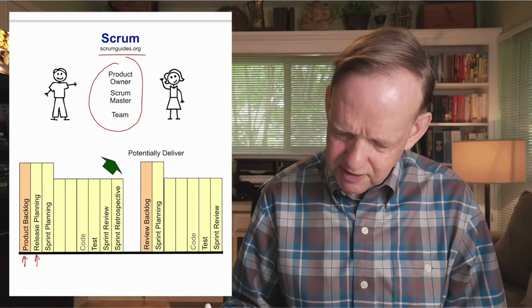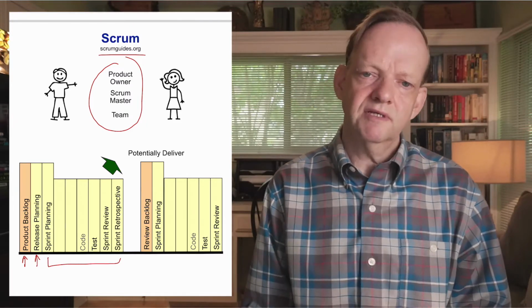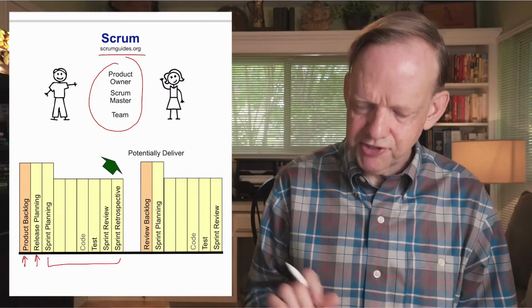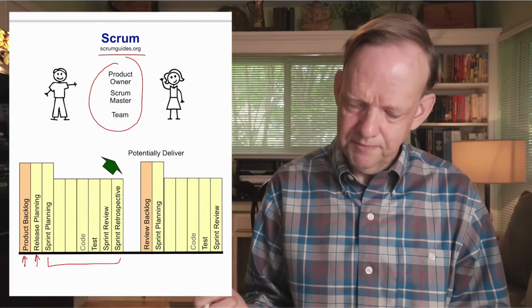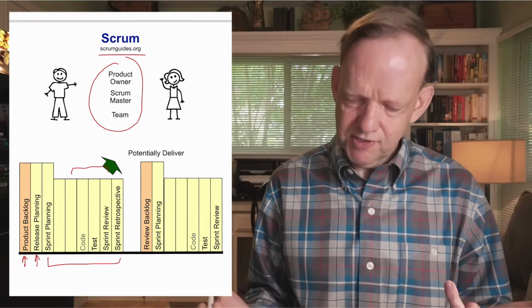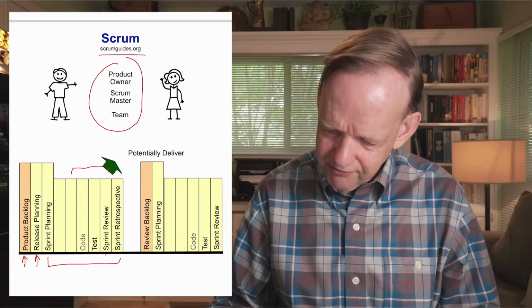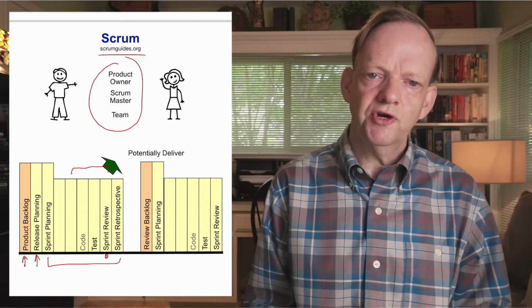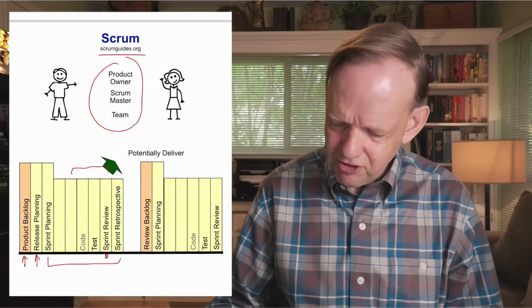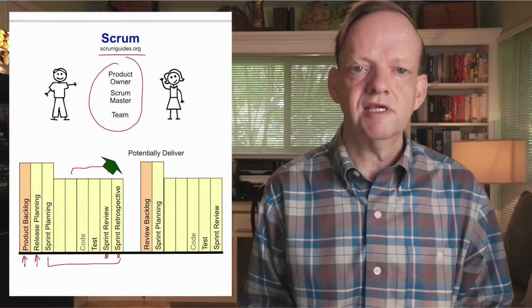So we're basically determining the tasks and time and who's going to do what for the team for the iteration, which could be 2 or 4 weeks. And then we go through the iteration itself and then track progress. And then at the end, we have the demo, basically to show the customer what we have built and get some feedback on that.